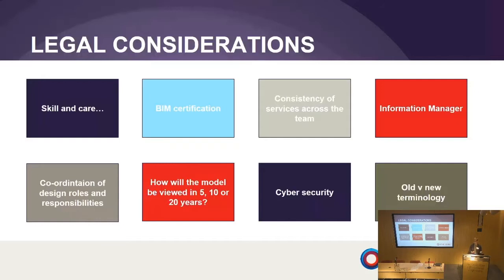And if it's fuzzy, for example, if the services say you will provide BIM Level 2, I'd be really questioning that. What does that mean? What is the client expecting? It might be the same expectation that you have, but unless you have the conversation and you ask the question, it's not clear and nobody's clear, and that's when disputes can come about. The misunderstanding can lead to real problems happening.